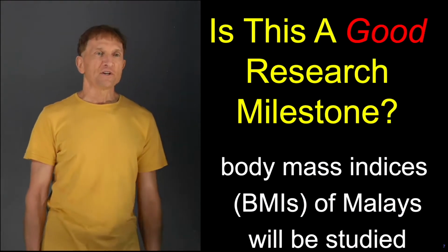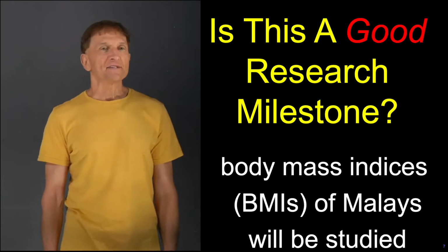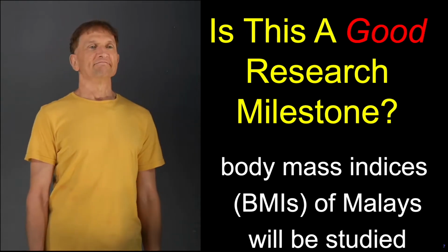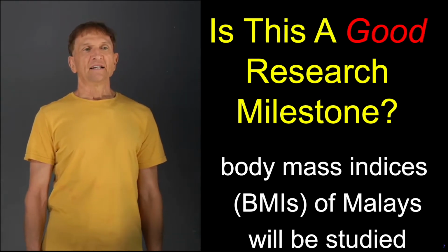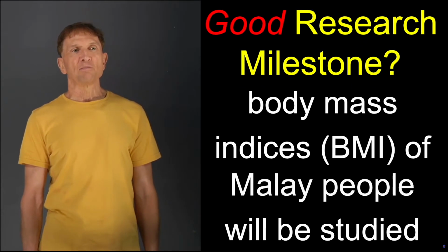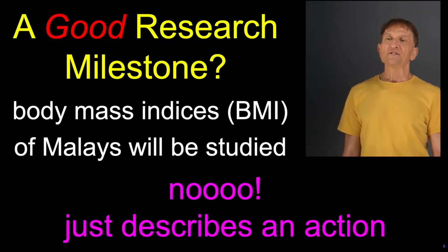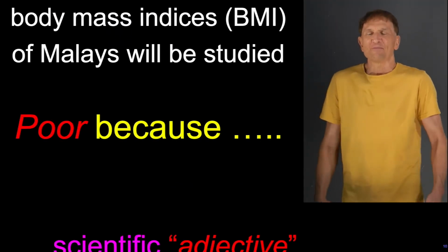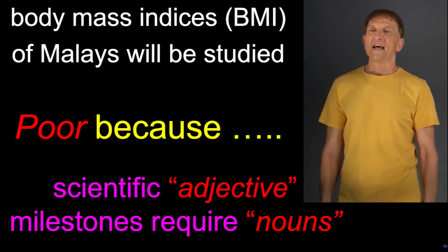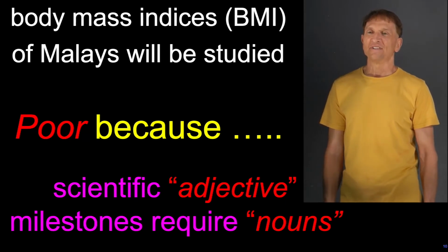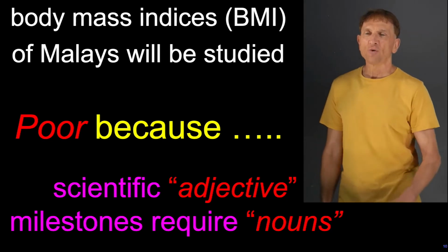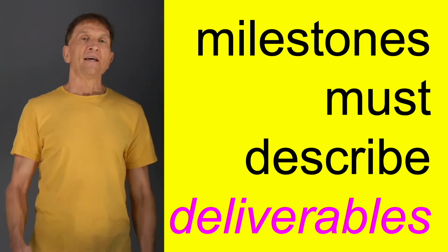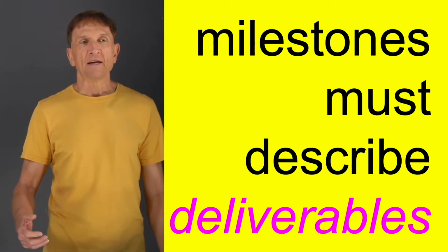Is this a good research milestone? Body mass indices, BMIs, of Malays will be studied. Well, I don't think it's a very good milestone because it just describes an action. It's a scientific adjective. Nobody else says that, but I do. But it needs a concrete noun. It needs somewhere where we're going, a place. Milestones must describe that place. It must describe deliverables.